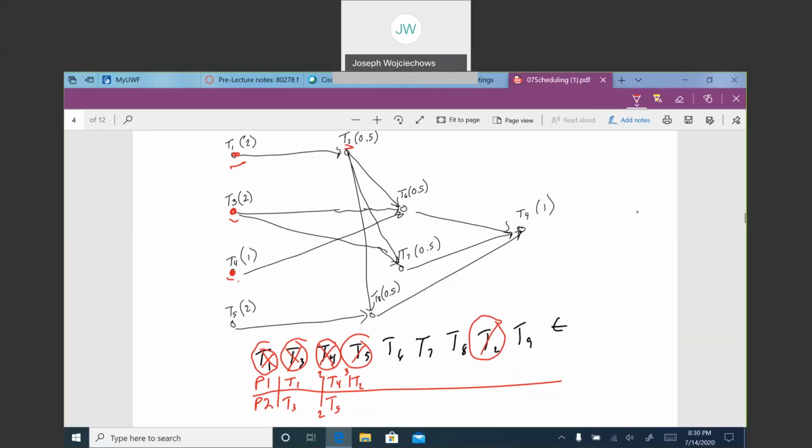Okay. Now task 2 takes half a day. So that puts us at day 3.5, and task 3 still doesn't get finished till day 4. So task 2 is complete. Done. Now, does that free up any other tasks to be completed? Let's see. Not task 8. Can we complete task 7? Looks like it. So task 7 is available, and it looks like task 6 is available.